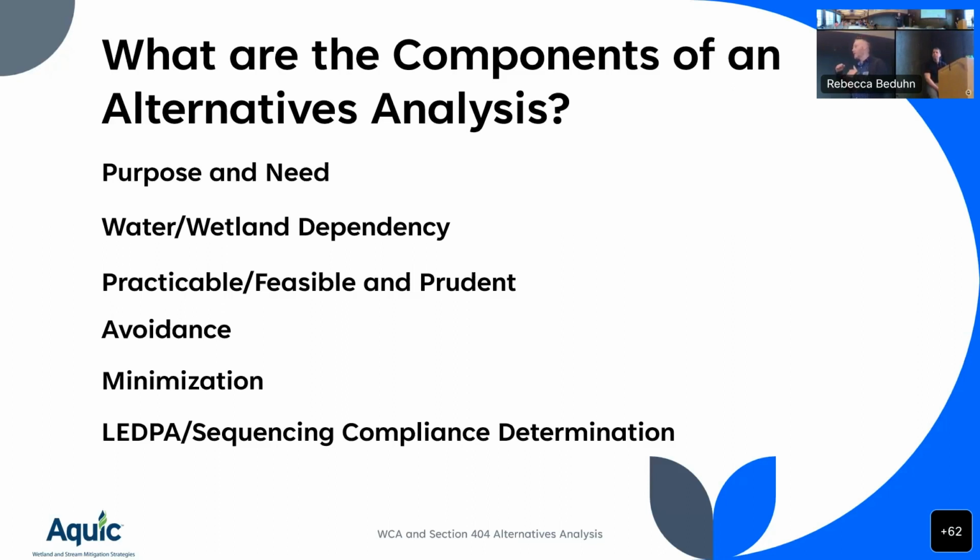So remember, back to the purpose of WACA, right, to avoid impacts. Well, sequencing as a review standard has the avoidance, the minimization, rectify, restore, then the replacement, right? That's all in descending order. In fact, when you read the statute for wetland replacement, it's like 2 pages long.